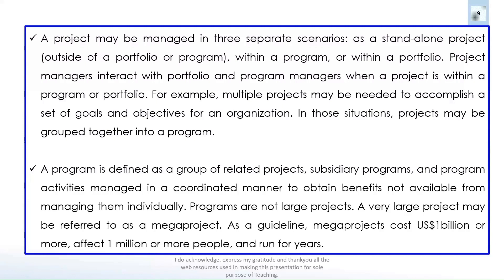The township program has a first project called infrastructure development — roads, electricity, water, sewage, everything. The second project may be commercial complexes. The third project could be residential compounds. The fourth project could be cafeterias. The fifth could be a big shopping complex or malls. This is how you build a program of a city or township with multiple projects, distributing jobs and managing resource pressure better.